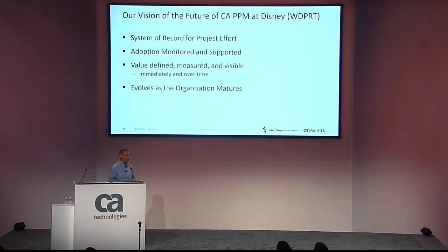Part of it also is realizing that the tool evolves as the organization matures. So we did a baseline and looked at where we are in our maturity. Implementing the tool doesn't immediately propel us to a level 5 proficient organization. That takes time and effort, so we need to roll out the functions aligned proportionally with the maturity level of our staff and our capabilities to drive success.